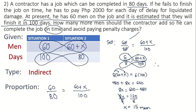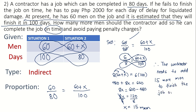Therefore, the contractor needs to add 15 more men to finish the job on time. To finish the job in 80 days, he needs 60 plus 15, which is 75 men total working on the construction.